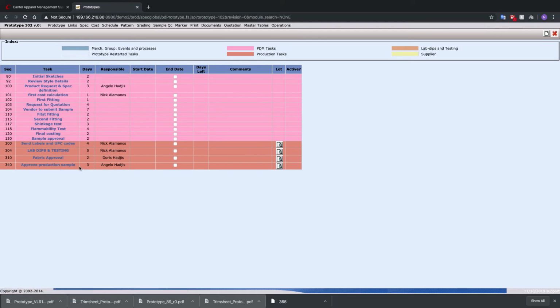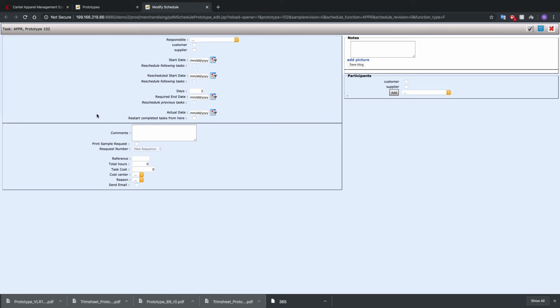So first thing I need to do is give it a date. When do I want this to be ready? So let's click on sample approval, and I want the sample approval to be ready by 12/24. Oh, okay, let's not be that bad. Let's make it a day before Christmas Eve. All right. So I want to schedule all the previous tasks based on this date.